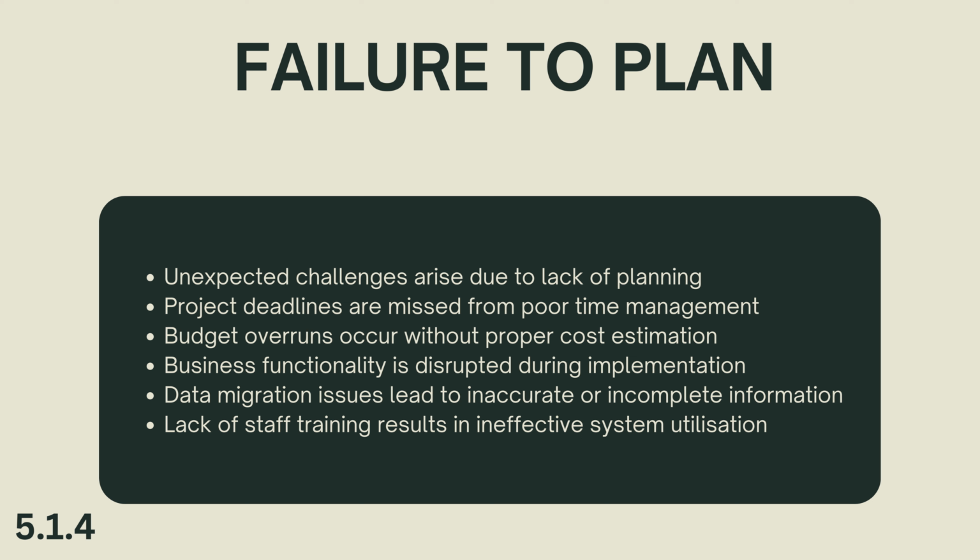For example, imagine you're implementing a new customer relationship management (CRM) system. If you fail to plan for data migration or staff training, you could end up with a system that no one knows how to use effectively. Or worse, one filled with inaccurate or incomplete data.